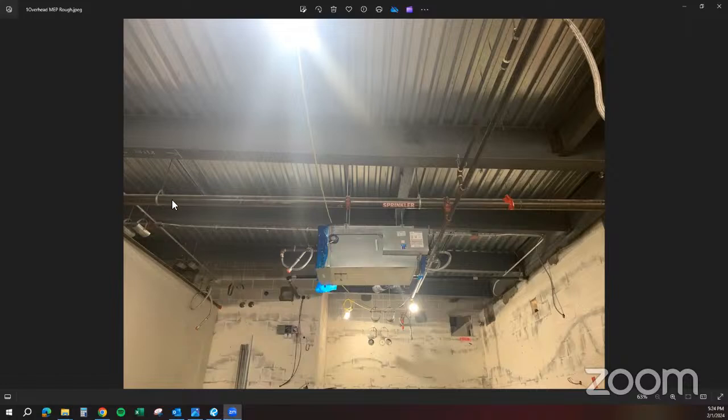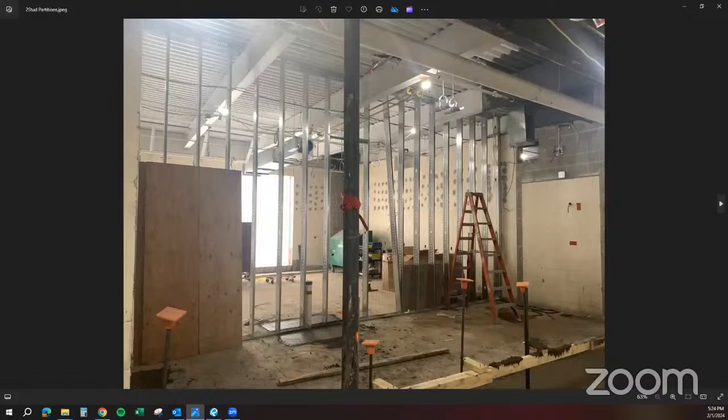As you can see, first photo here, we've got the sprinkler. A lot of that sprinkler pipe is remaining, so that is in. New hangers are going up. The VAV units for the ductwork air handling systems are also going in. So they're in a pretty good shape as far as the overhead roof goes. Starting on all that now that the demo is largely complete. The carpenters are also on site working on stud walls. We have this phase being different than the previous phases where 1999 construction.